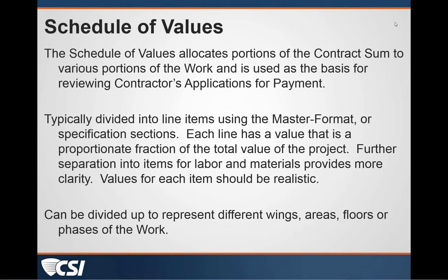We require that this schedule of values be submitted prior to the first pay app so we can review it. You want to make sure that the contractor is not front-end loading his schedule of values to where he's getting paid up front in advance for work, because that can cause you problems in the end. One thing that I typically do is have him break the schedule of values up into smaller chunks of work so that they are easily identifiable. You can do it by floors, you can do it by wings, you can do it by faces of the work. The purpose is to accurately pay him for the work that's done.